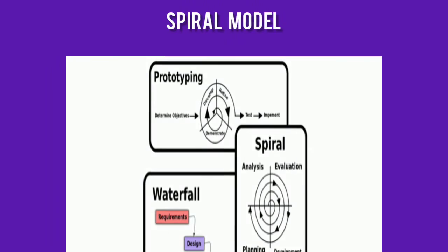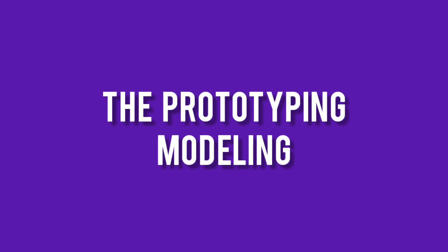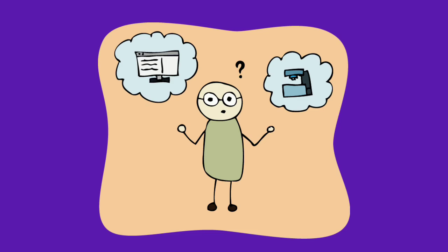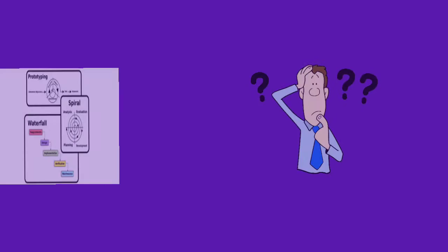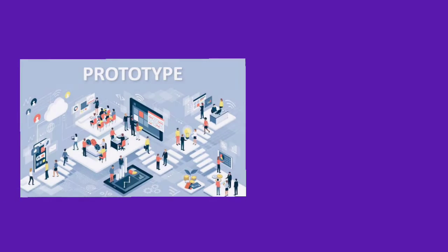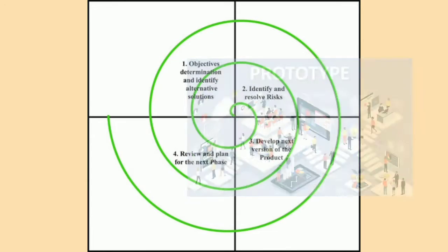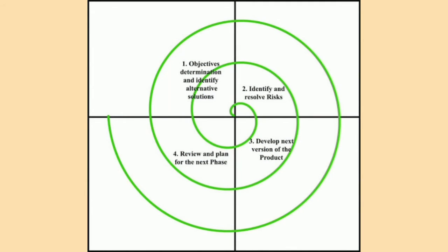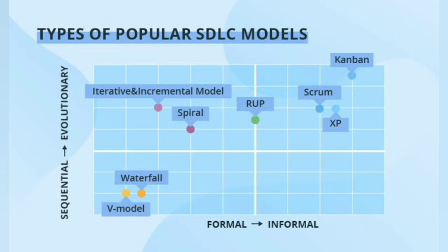The prototype modeling supports risk handling, but the risk must be identified completely before the start of the development work of the project. But in real life, the project risk may occur after the development work has already started. We cannot use the prototyping model then. In the spiral model, the features of the product developed and analyzed at the risk point in time are identified and resolved through prototyping. Thus, this model is very flexible compared to other SDLC models.